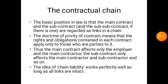The next topic is the contractual chain. The basic position in law is that a main contract and a subcontract, if there is one, are regarded as links in a chain. The doctrine of privity of contract means that the rights and obligations contained in each contract apply only to those who are parties to it. The main contract affects only the employer and the main contractor, and a subcontract only affects the main contractor and subcontractor. If the main contractor is affected by any problem or situation, this effect is totally transferred to the subcontract.